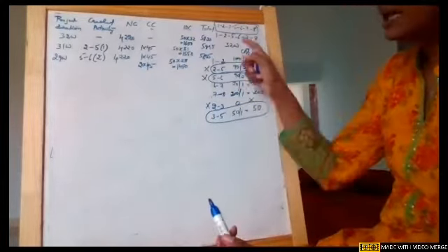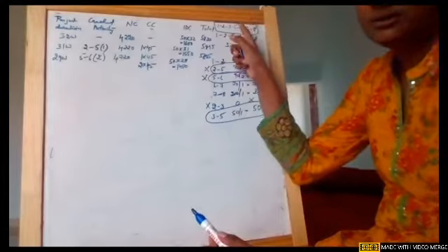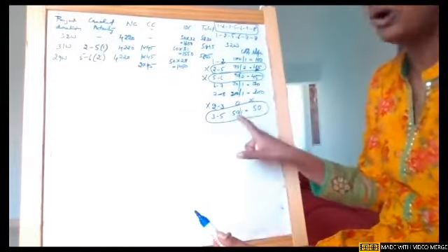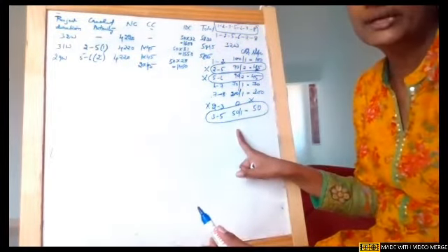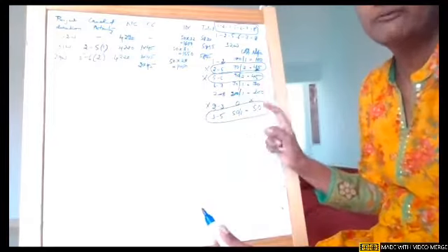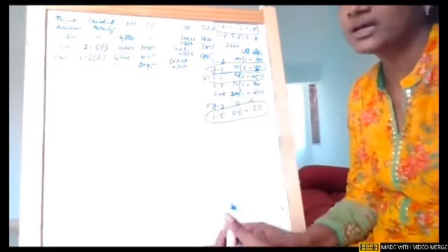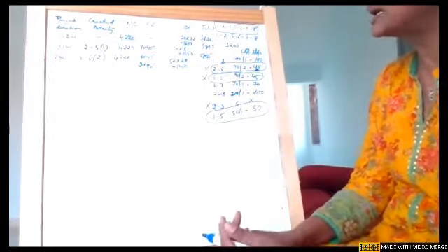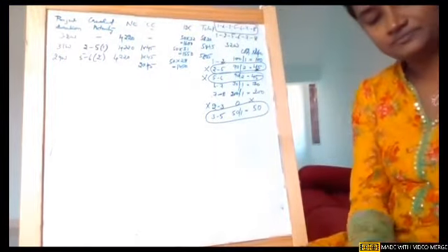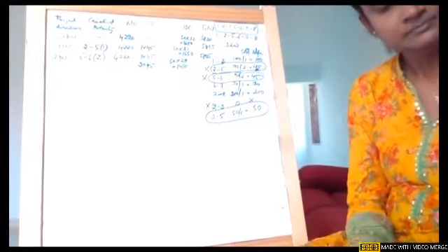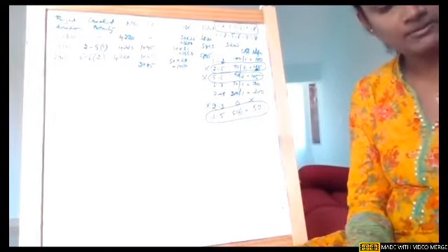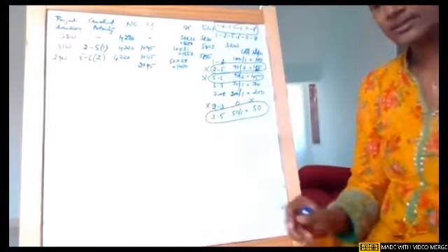Girls, you can see when I am crashing the critical path, if it is modifying, we need to also calculate the cost slope for the new critical path activities. If it is there in our old one, no problem. If it is a new activity which is not in our earlier critical path, we need to start calculating it. So we will again construct the network. We just crashed 2 to 5 and 5 to 6, no? Okay, I'll just remember that.